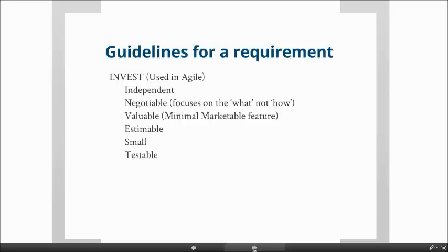Now there is something that we call in Agile. It's called minimal marketable feature, and this is not unique to Agile. It's really just good practice wherever you go. Minimal marketable feature means what is the minimum that I can build to meet the requirement. Because if you build anything more than that, then you're really building in overhead. You're making it more expensive, making it take more time, and possibly delivering some additional complexity that is not necessary.